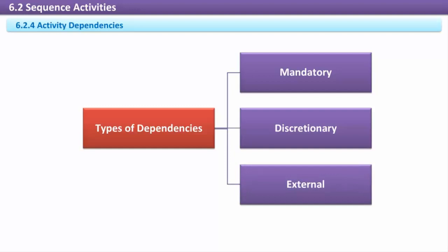External. The dependency is outside of the project and usually beyond its direct control. For example, a technician can't begin installing the equipment until the vendor delivers it. Though sometimes external dependencies can be influenced or made contractual, such as with a vendor or consultant, they can usually be altered. External dependencies can also lead to scheduling problems when no hard date is available. For example, some modes of transportation can provide only a date range of when materials can be expected to arrive.